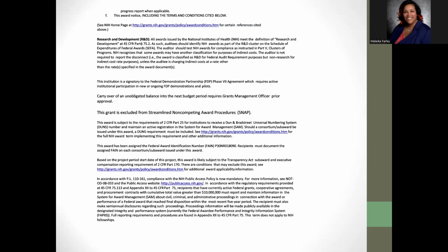It's rare because NIH grants don't typically go longer than 5 years, or by the time you hit 5 years, you've already spent the money from the first year, so it's okay. But we did have a case where the award was in a no-cost extension, and it was a longer term grant, and we did lose a significant chunk of money because the funds expired. So that's just something to be mindful of: what fiscal year were my grants awarded in, and are we coming up on 5 years, because we do want to make sure those funds get spent before they expire.